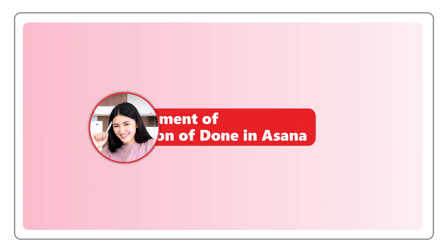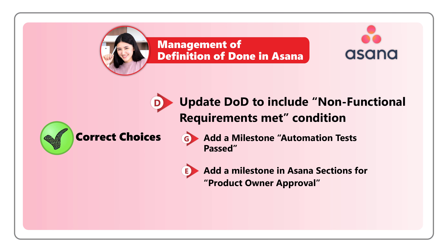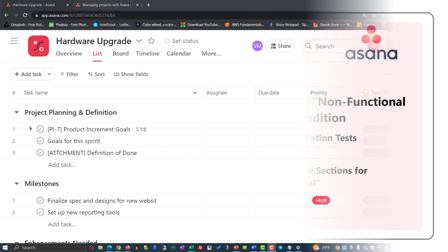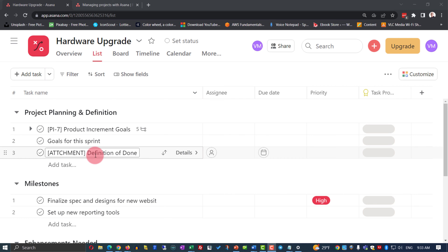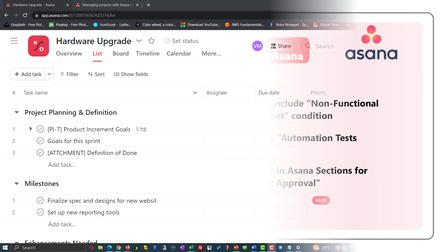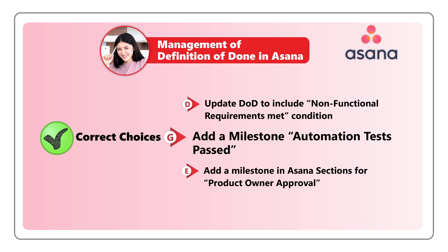So how can management of definition of done be accomplished in Asana? If you need to use Choice D and update definition of done to include non-functional requirements met condition, you might decide to make changes in the project planning and definition sections inside Asana. This section consists of product increment goals, goals for the sprint, as well as an attachment — probably a Microsoft Word file — with the definition of done. To add an additional requirement to the definition of done list, you would add a new item in the list. In a very similar way, you can implement Choice G — add a requirement for automation tests passed.